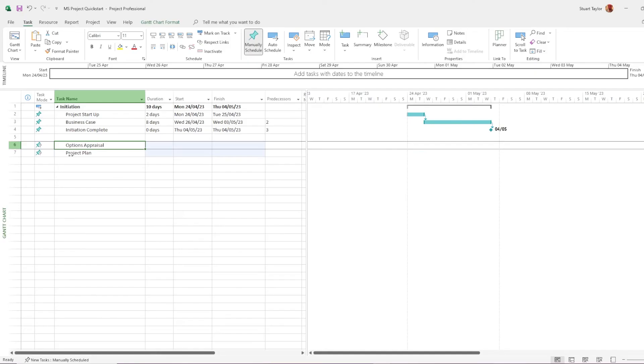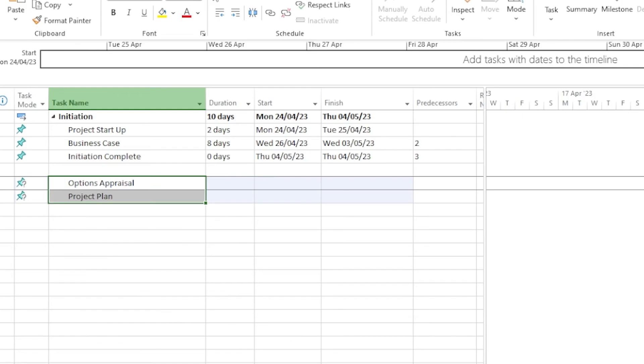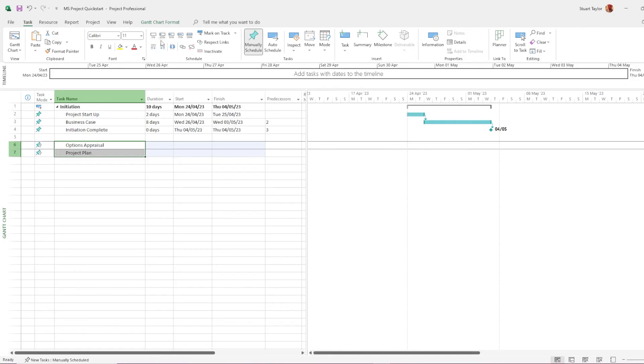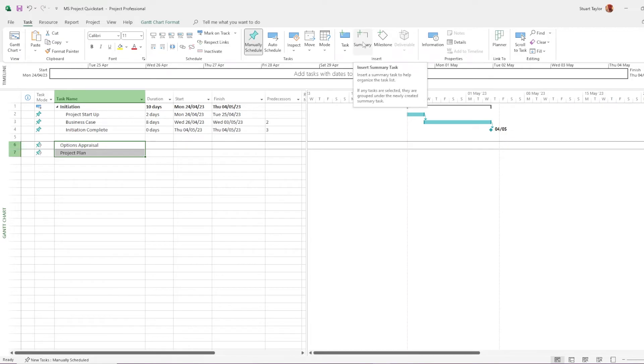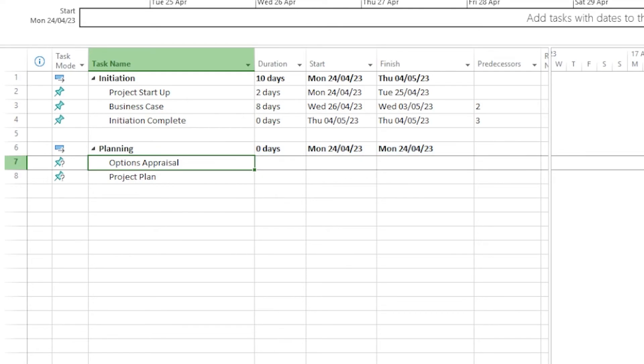Now I'm going to show you a slightly different way to nest those tasks. You'll see that I've created two tasks here, which sit in the planning stage, but I haven't put a row for the planning stage. All I have to do is select the tasks that I want to include in the stage and on the task tab, go across to the summary button. You see it inserted a new summary task and all we have to do is select inside that cell and change the name.